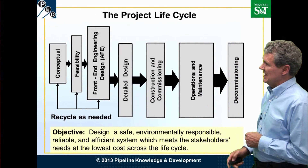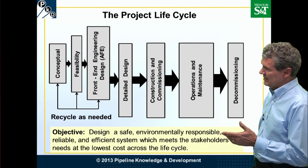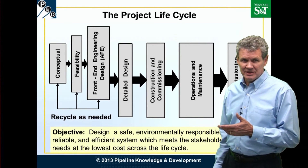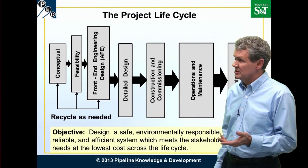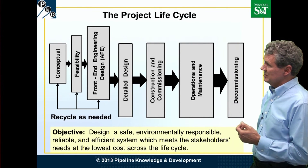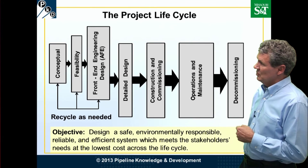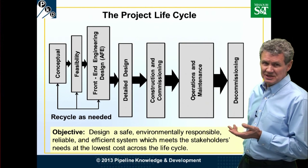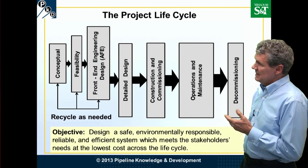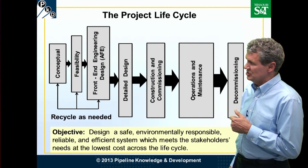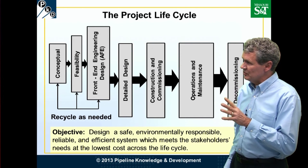Here is the project life cycle. The project life cycle for a pipeline project is not necessarily different than for other projects. We start out on the left-hand side with a concept — a conceptual phase — then we go into the feasibility stage: can we build this, will we make money? And then we go into front-end engineering and design. In these first three stages there may be a bunch of recycle through those.